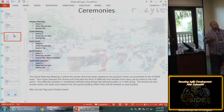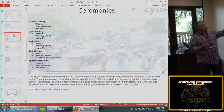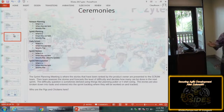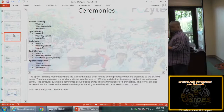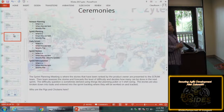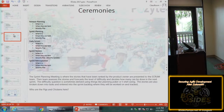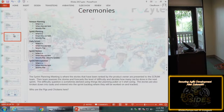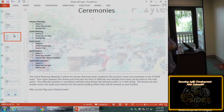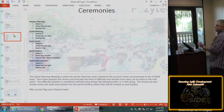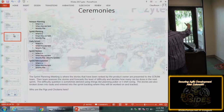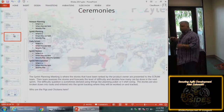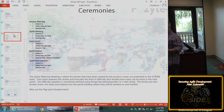These are the Scrum ceremonies: release planning, sprint planning, the daily Scrum, the sprint review, and the sprint retrospective. Release planning is where you decide what functionality you hope to release over the next year or six months and rank it. Sprint planning is sitting down with the team and product owner to decide what functionality goes into this sprint. They play games like planning poker and t-shirt sizing — they rank stories by difficulty and decide which ones a team can handle in the sprint period.